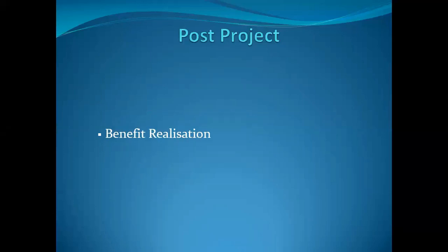And so here, benefit realization. This is something that you carry out after the project. Not all BAs will be asked to do this, but there are some projects. If you are still in the organization or still on that project, they may ask you to do this. This is to measure the benefits that are being realized. But it's not something that you can do within a week. You can't measure something that you just delivered within a week. No, that's not realistic. But sometimes it could be in one month. It could be maybe after six months. They may say, oh yeah, I want to see whether there's any benefit.